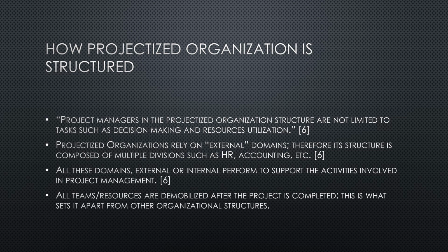All the activities that these domains that it pulled from exist to serve project management for the time length of the project. Then at the end of a projectized organization project, all teams and resources are dismantled. If you were working part-time, you're out of a job then. However, if you're full-time, you're most likely being funneled into another project that needs you to fit that domain. Projectized organizations don't stay together after a project is done. It's dismantled, and that also differs it from something such as a structured organization.